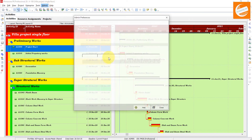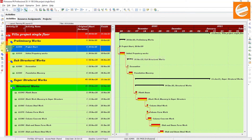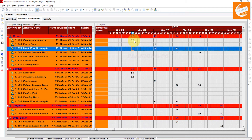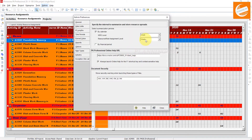We will check here - if I set the WBS level as 'Week' and the resource assignment level also as 'Week,' close that window and go to the resource assignment view. Here in the resource assignment view you can see the summarization is showing on a weekly basis at the WBS level as well as the individual resource level. This is the resource analysis assignment sheet and all data is on a weekly basis.